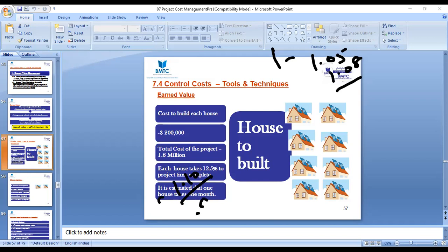If you get 0.90, you get only cents, or paise, so for $1 of investment you're losing 10 cents. That is not a good return on investment. So always the CPI and SPI should be above 1 or equal to 1. It's clear, guys?